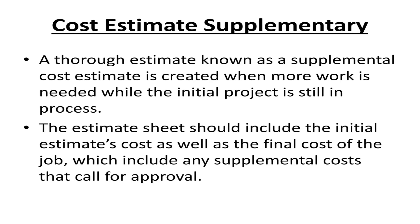Cost estimate supplementary: A thorough estimate, known as a supplemental cost estimate, is created when more work is needed while the initial project is still in process. The estimate sheet should include the initial estimate's cost as well as the final cost of the job, which includes any supplemental costs that call for approval.